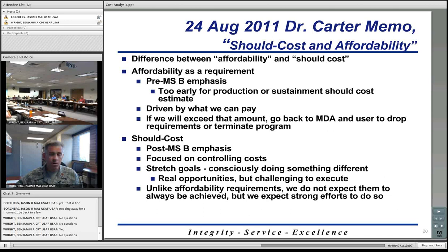Well, they certainly can. Those cost estimates would go in the historical database, and you can use those cost estimates along with others to come up with your current program. So when you're talking about dusting them off, yes, I think there is a certain element of dusting off that they'll do, which will then help you arrive at your current cost estimate, whether that be using the analogy method that we talked about previously.